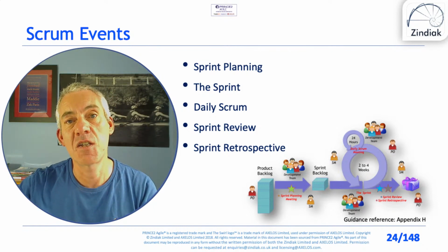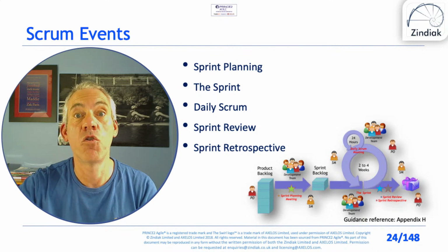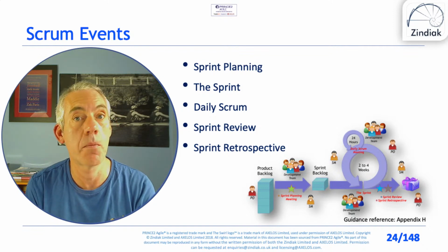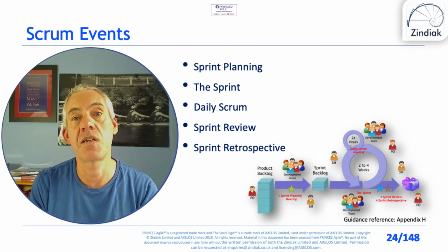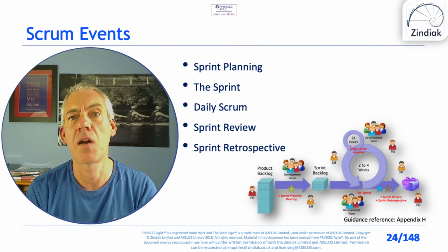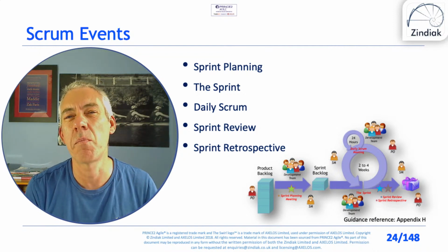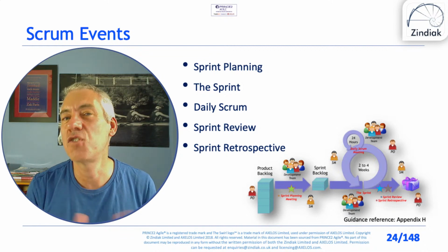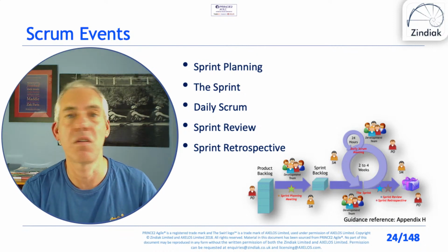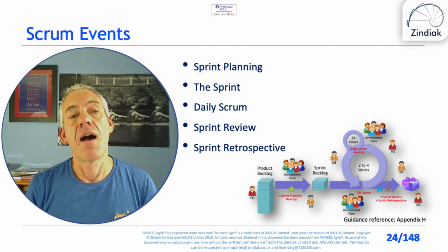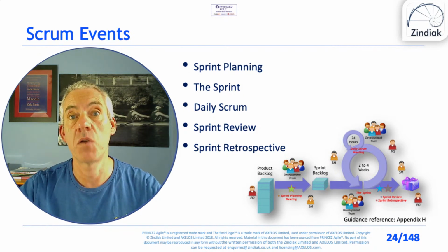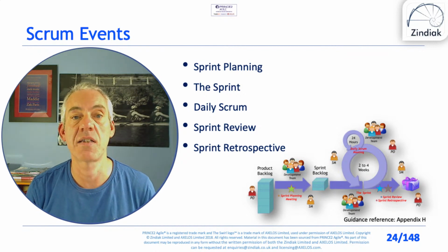So you can see the sprint goal is really important for the daily scrum, because without it you can't do the daily scrum as defined in the scrum guide. So we do need to have a sprint goal, and I've seen some teams, this is really quite common, where they just say, well, the sprint goal is to deliver the sprint backlog, but it doesn't really encapsulate it. So do try to encapsulate it as more of a vision rather than just we're going to try and do the work. And if you're struggling to stay within the 15 minutes, do keep it achievement focused on the sprint goal, not just activity.